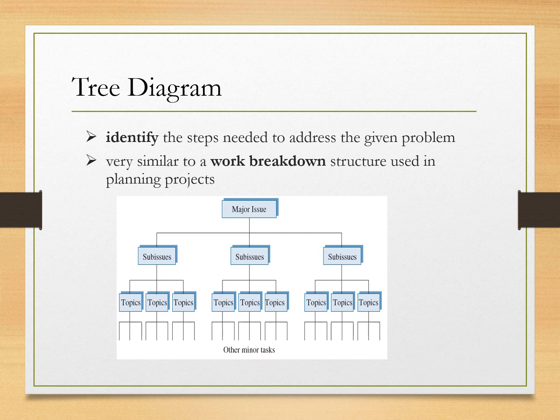It's basically the same concept as a work breakdown structure. The idea is simple. We start with a big goal or problem on the left side, and then we break it down into smaller and smaller pieces as we move to the right, and each level gets more specific and more detailed. Here's why this tool is so useful.